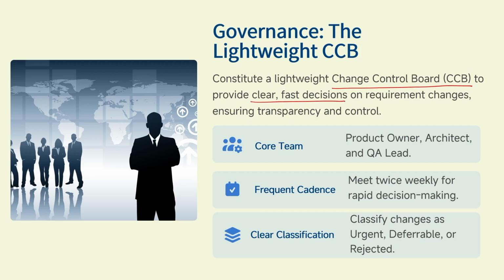So it is not that whenever a stakeholder turns up with a change request, they will take it all of a sudden. It will go to the change control board. They will check all possibilities, whether it is feasible, whether you can do it within the corresponding time. Everything will be checked.